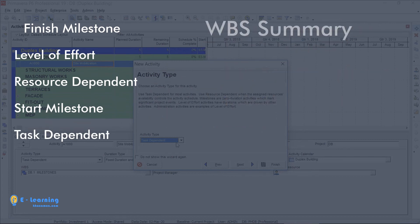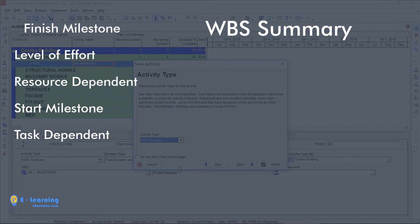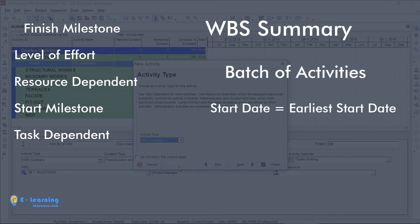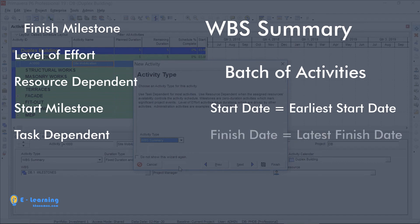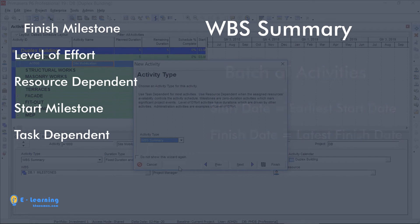And the last one is WBS summary. It is a batch of activities. Start date of WBS summary is the earliest start date and finish date is the latest finish date of the activities in the WBS group.